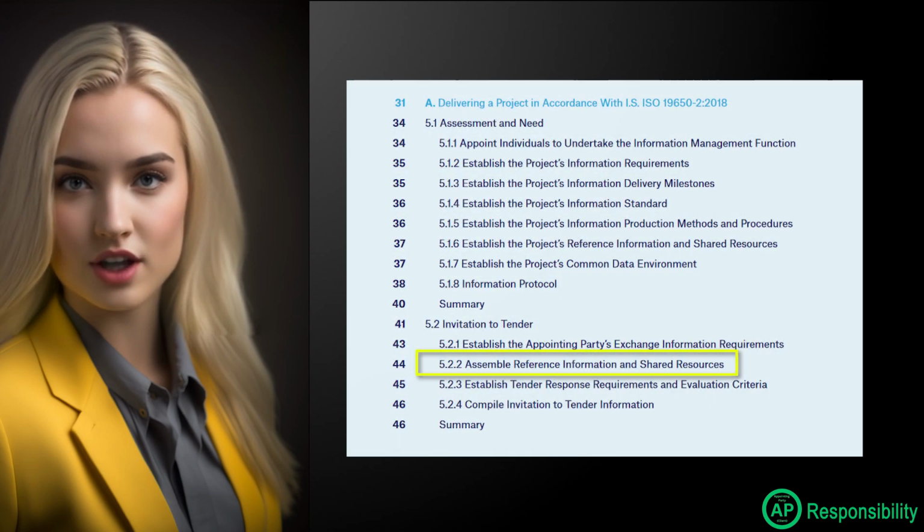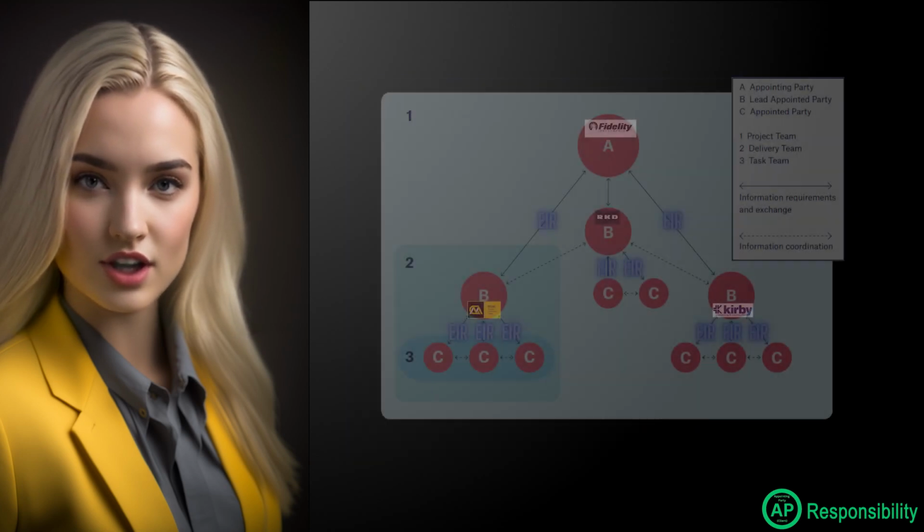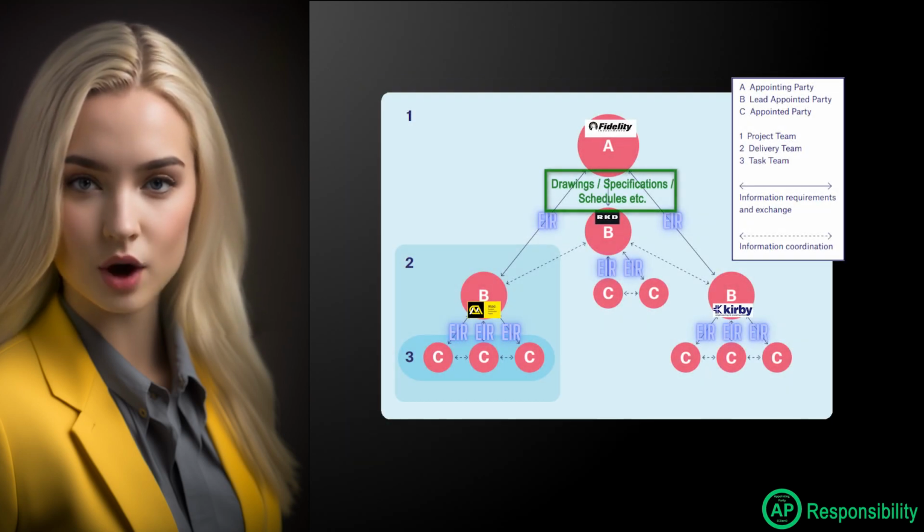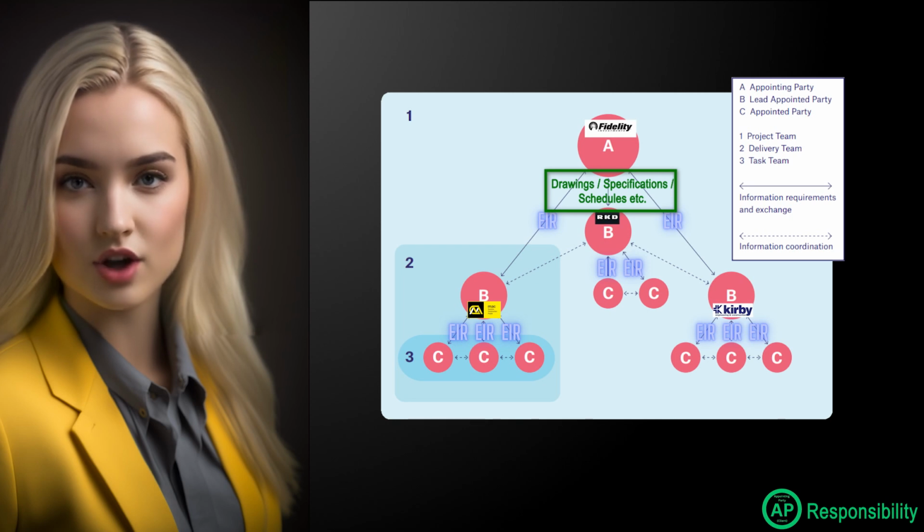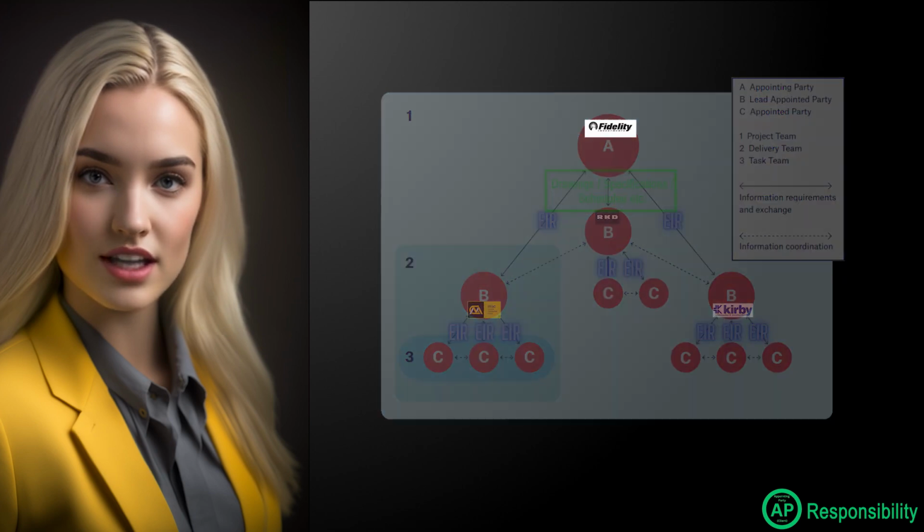Step 2. Assemble reference information and shared resources. The appointing party should assemble reference information and shared resources that they wish to share with each prospective lead-appointed party during the tender process. It is recommended that this is done securely through the CDE.